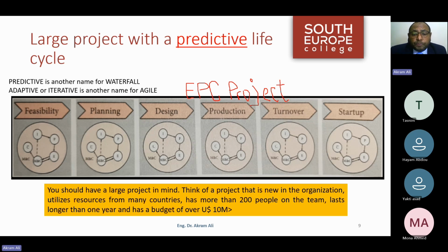So what I do is I make a top level plan for the 4 years. But I always do projections, which is look ahead. So I have to make a 6-month look ahead. I come to the activities expected for the next 6 months, and I start to do progressive elaboration for the plans and the schedules.